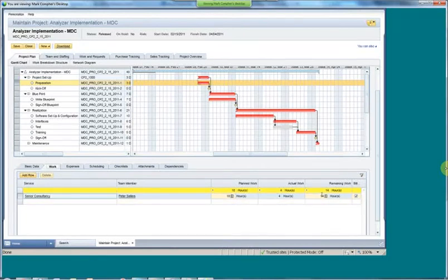You can also set up a very flexible level as to whether you want to bill for the entire project, bill for portions of the project, bill for people that are working on the project. So in this case, I have a billable tab that's all the way down here at the individual working this task, that if I had two people working and one I wanted to have billable, I could make that change in the system. So again, just very flexible.